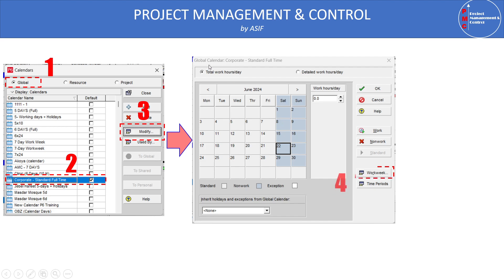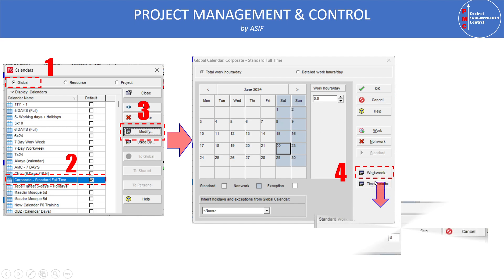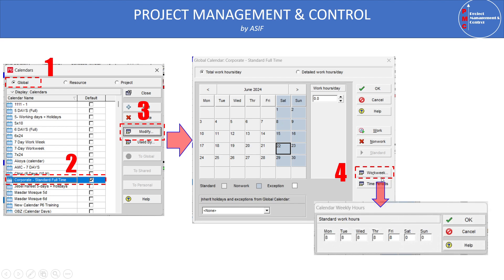When you click Modify, the calendar dialog opens. It shows that we have two days of holidays. When you select the Work Week tab, it shows how many days are assigned for work and non-work. Saturday and Sunday are marked zero, meaning they are holidays. Sunday to Friday are working days. Because Saturday and Sunday are marked as holidays, when we go into the Primavera Gantt chart it will show Saturday and Sunday as holidays.